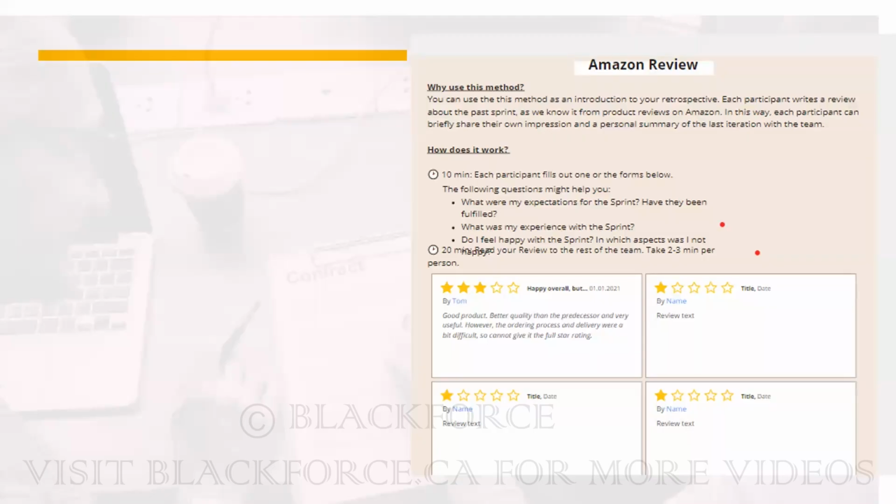Before, in the old Scrum, you put it in the next sprint. But in the 2021 guide, you just put them in your backlog. Then you pick it up as needed, when you want to resolve them. So that's basically what a sprint review is all about.